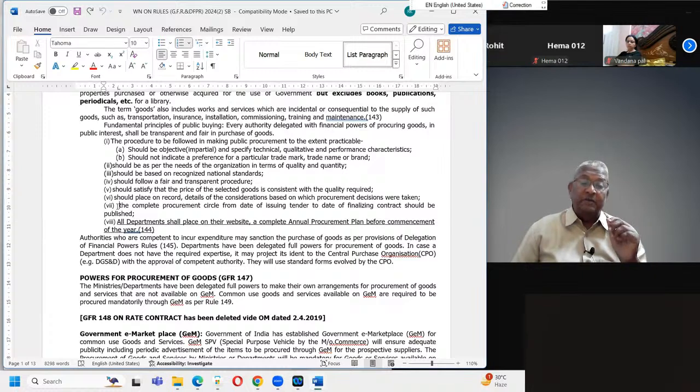So that security will be taken. Bid security will be returned, and performance security will be taken from the successful tenderer. But all others whose tenders, whose bids are rejected, their bid security will be returned on the same day or maximum 10-30 days के अंदर उसको वापस किया जाएगा. Then within 21 days the contract has to be signed, successful bidder जो भी है वो 21 days के अंदर आकर कॉन्ट्रैक्ट साइन करेगा. साइन करने के बाद दैट मे बी शॉर्ट टर्म कॉन्ट्रैक्ट या लॉन्ग टर्म कॉन्ट्रैक्ट.